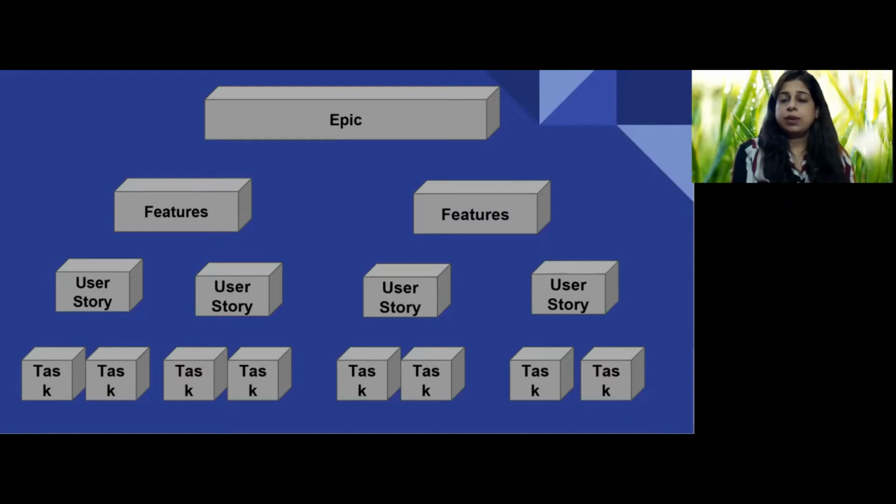Whether you're breaking down an epic, a user story, or any work item in your backlog into tasks, it's important to remember to split them across functional boundaries and not technical ones. For example, if the work item is enabling online payment for an e-commerce store, you can split it into debit card payment and credit card payment instead of design, development, and testing.